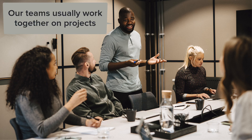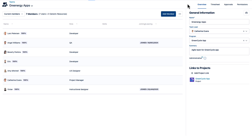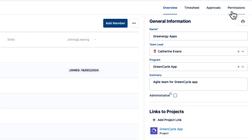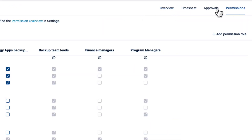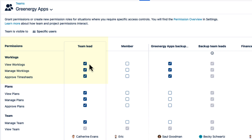It's common for team leads to be in the same JIRA user group as project managers and also get these permissions, since multiple teams often work on multiple JIRA projects. This does make it easier to manage project permissions, but if your organization requires that team leads should manage only their own team's work logs, you can instead set that level of control with Tempo team permissions. And I'll cover these in another video.